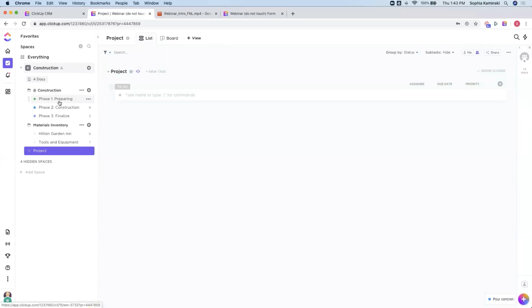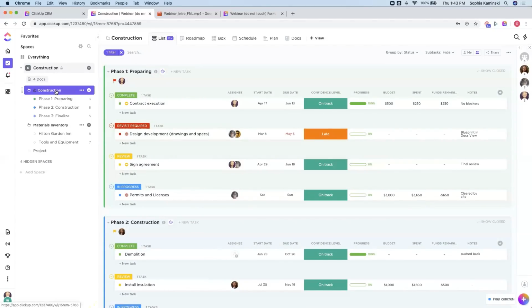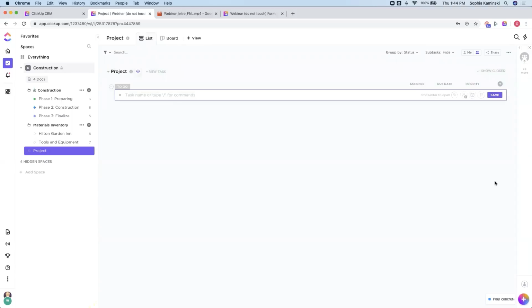As far as breaking down different project sectors, what you have to think about is really just the size of the project. So regardless of the industry it's oriented around, best practices are to create a folder for more complex projects that have multiple phases or pieces involved. Create a simple list for projects that can be completed by just checking off a list of simple tasks.